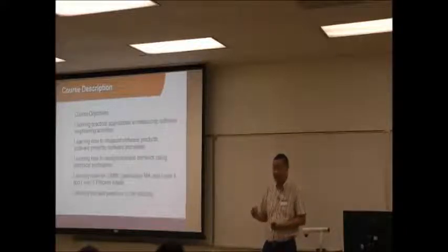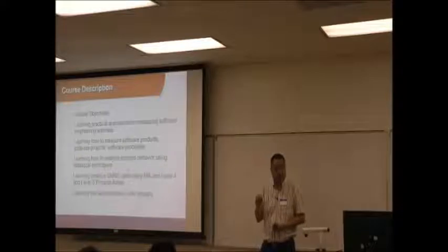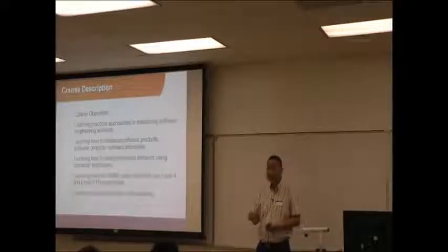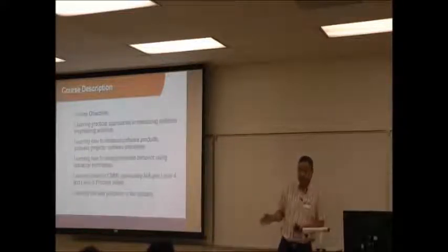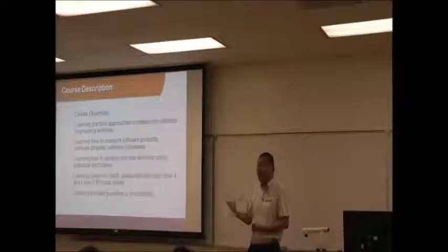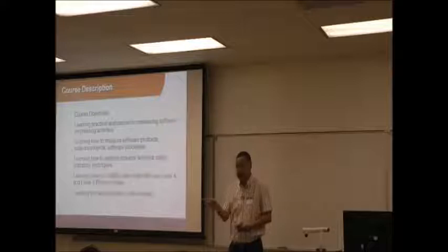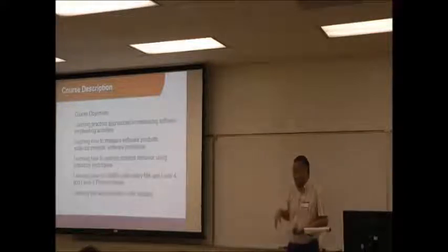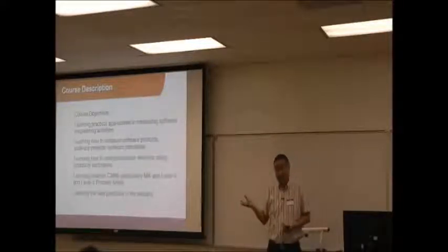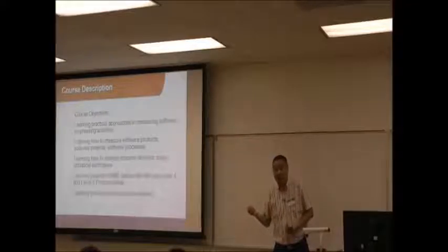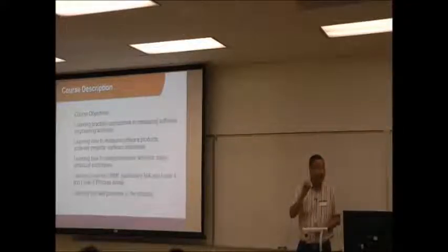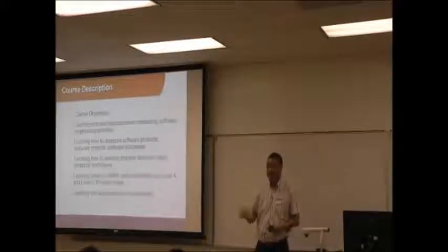It's very difficult. There's a fundamental sizing estimation problem in software we still have not solved. The so-called size of software. How do you measure the size? Okay, a lot of organizations use lines of code. But that is too technical. It cannot objectively measure the amount of features you want to develop.